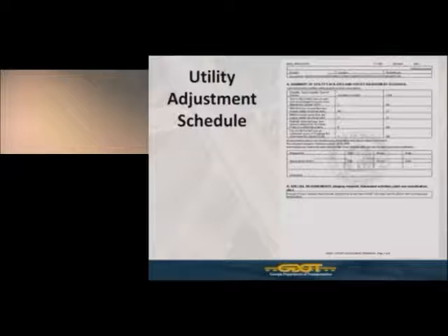Those are questions that would probably be asked. And if not, then additional justification would be needed as to why that could not occur. But for this size of project with only 8 poles here, it may not adversely affect the project schedule, so this may not be an issue. But it may be something that's just questioned and you need to clarify.